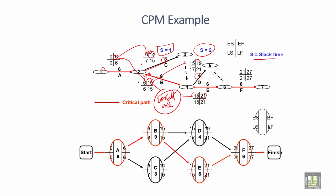Now again, you choose the largest, which is 21. Take this 21 over here. 21 plus 6 is 27. Now go backwards here. Put 27 here. Then 21. Start with 21. 27 minus 6 is 21.